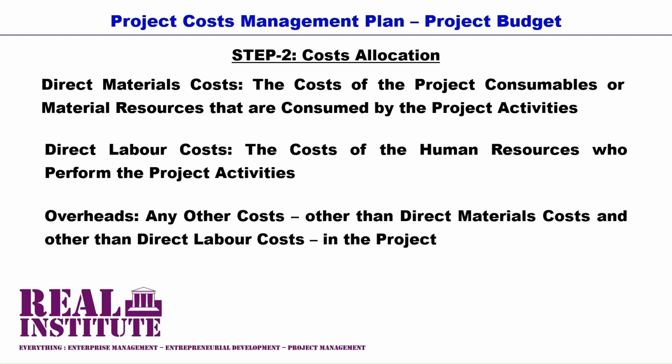Overheads, on the other hand, refers to any other costs other than direct material costs and other than direct labor costs in the project. They can also be viewed as indirect costs that are incurred by a project in the undertaking of its activities. Project managers' remunerations is one example of an overhead cost in a project. The utilization of the performing organization's capital resources in a project can also be allocated or specified under the project overheads.